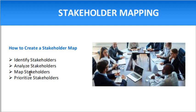The third step is to map the stakeholders with respect to their interest and influence. The fourth step is to prioritize them — stakeholders with high interest and high influence are the most important, while those with less interest and less influence have a lower priority. So the four main steps are: identify stakeholders, analyze them with respect to power, influence, expectations, and interest, map them by category, and then prioritize them.